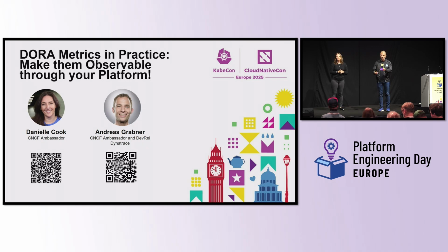We're using Jira for requirements management. I assume you use something like this, right? And lead time can be bad, if my marketing lead says, Andy, the hottest thing out there right now, we need this feature, and it takes me a month to actually start implementing it, this is also bad lead time. So for me, lead time starts with, she has an idea, how long does it take from that idea to be refined enough for me to start coding until this is out with our customers? This is why lead time for me starts with the inception of an idea.